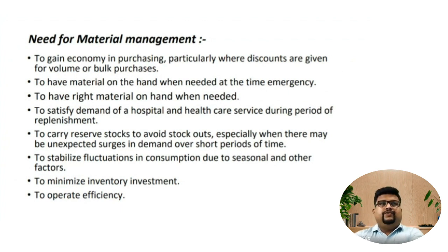in our project. First of all, we have to consider the cost is one of the important aspects, and that's the reason when we go for a bulk purchase, we get a good amount of discount, good amount of pricing benefit is being achieved. Then we will get a material with the contractor or with the vendor whenever it is required. So you should not be dependent on someone who is not actually giving you some kind of promises of delivering the material on the time, but he is not able to follow his time. And what happens? Your project may get delayed.